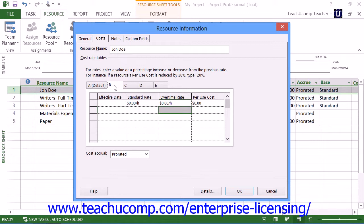In this case, you can enter the two rates into tabs A and B, and then switch the rate based on which type of task is being performed.